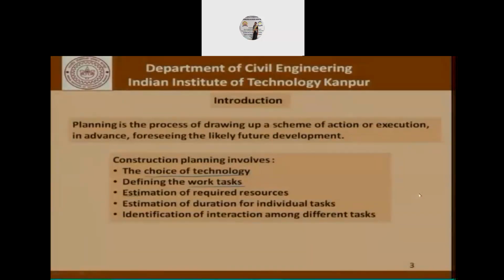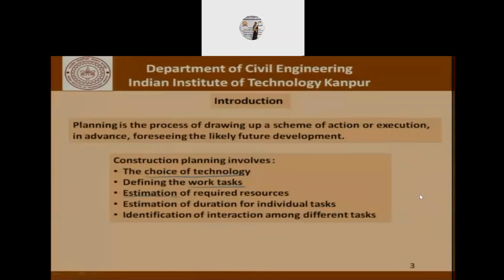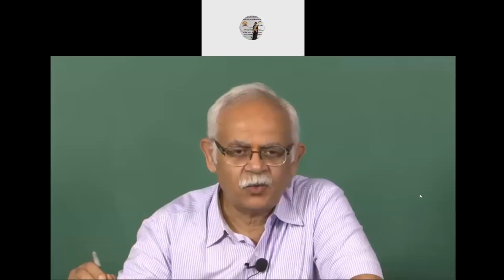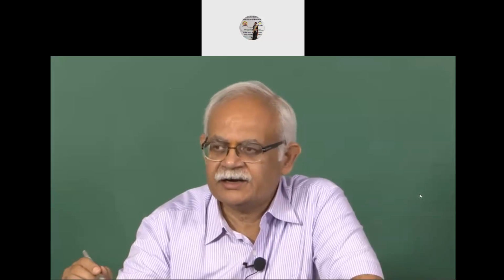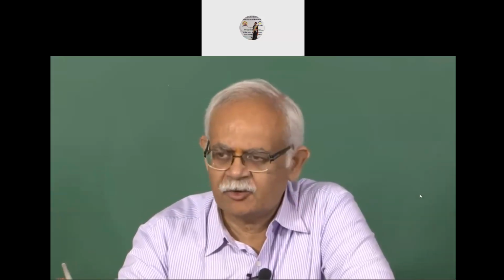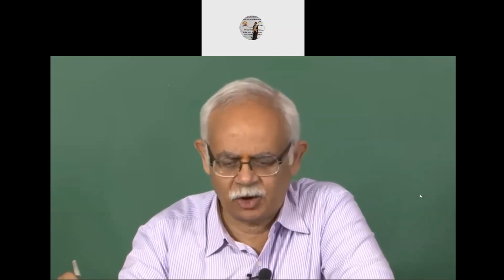Then there is this aspect of estimation of required resources. We break a job down to different activities, different tasks, and then try to find out for each task or job what are the resources required in terms of manpower, equipment, consumables, and so on.